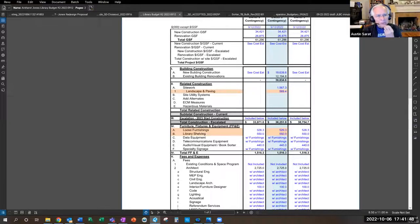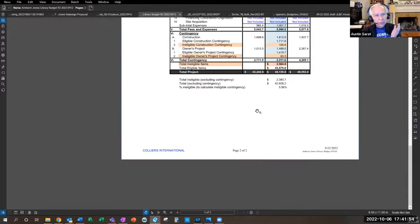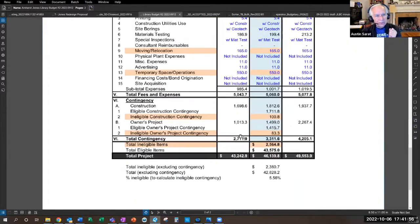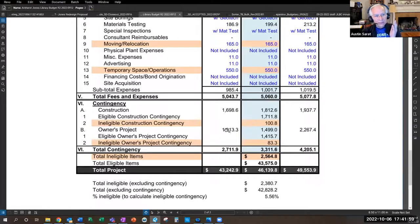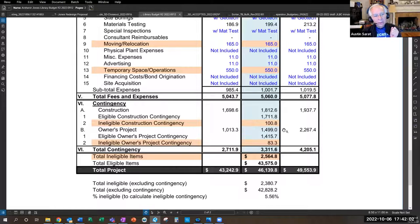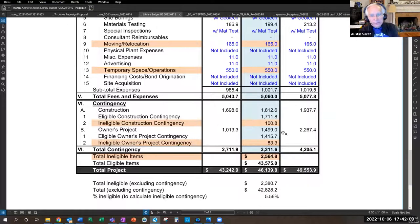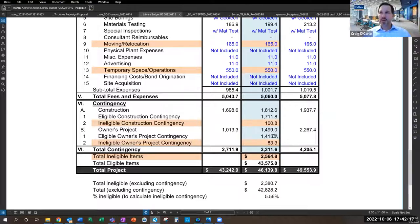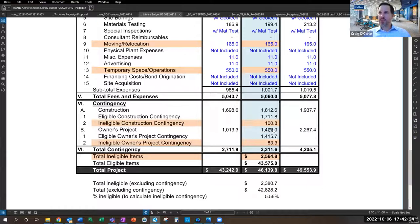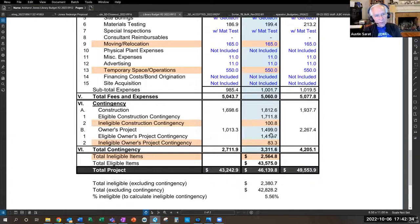Austin asks about using contingency funds if they're on the upper end for the book sorter. Craig confirms that would be an appropriate use of the owner's project contingency, which is $1.5 million for added costs and optional items between now and project end, assuming no more pressing needs. They would not use it as construction contingency for unforeseen construction issues.